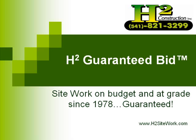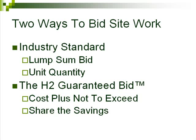In this video we're going to explain the H2 guaranteed bid. There are two ways to bid site work. The industry standard approach results in a lump sum bid and is based on a unit quantity approach. The H2 guaranteed bid is based on cost plus not to exceed, where we share the savings.